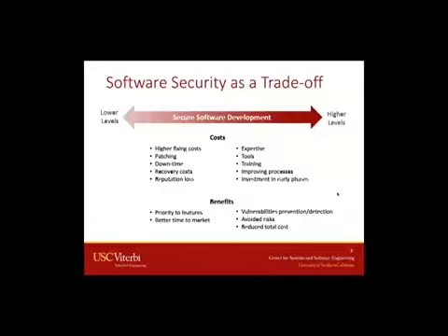So in secure software development, security will compete for a slice in a limited budget. To add more security, organizations and development teams usually need to remove features from the scope. On one side, less investment in security often means higher fixing costs, patching, downtime if the application is attacked, recovery costs, and reputation loss.